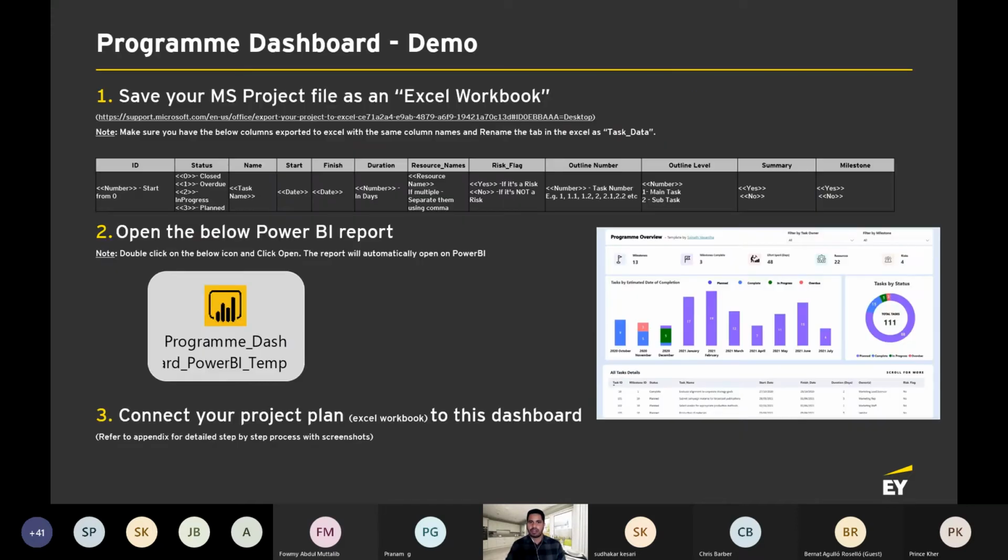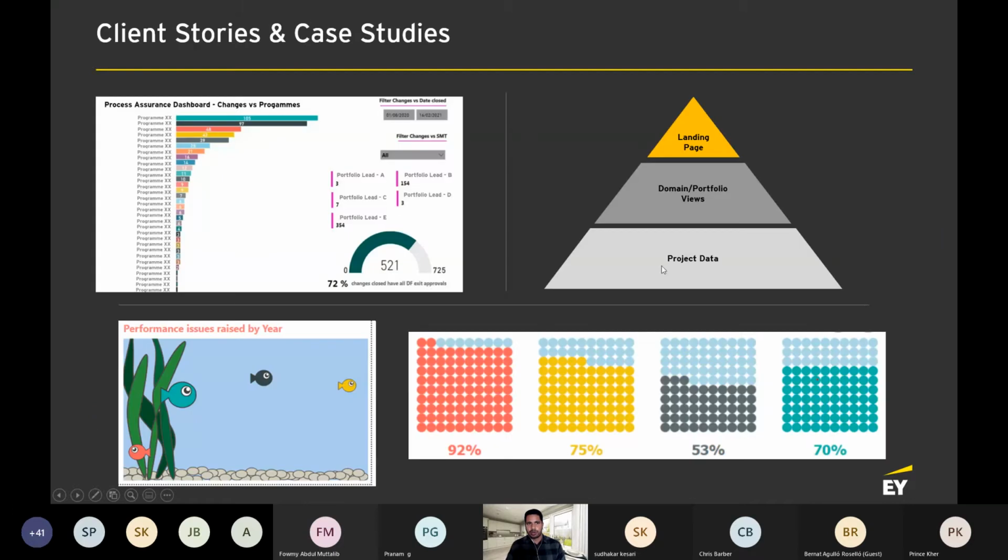Same thing like how we have exported the data from Microsoft Project Desktop into Excel. Similarly, the same approach: you put the query on Jira, export the data as JSON or HTML or whatever, and then you can import it into Power BI, and then you can visualize it. The only disadvantage with that approach is obviously it is manual.